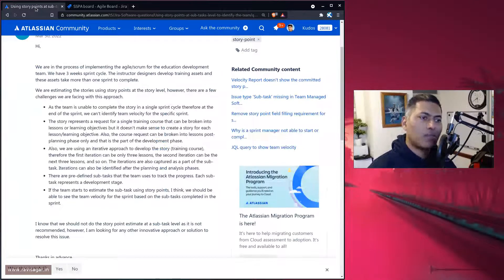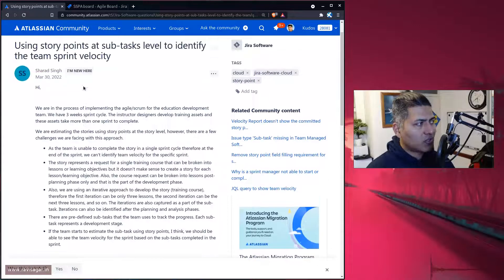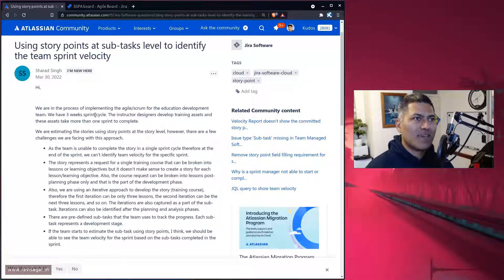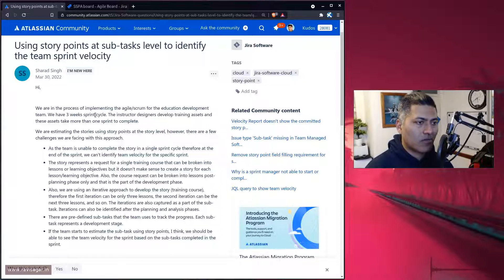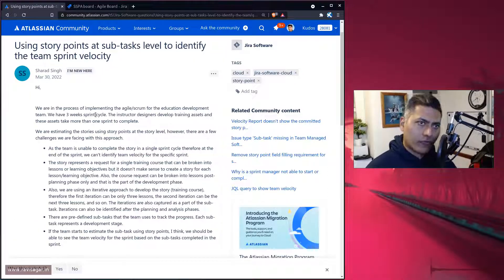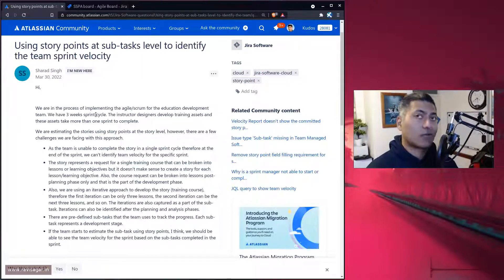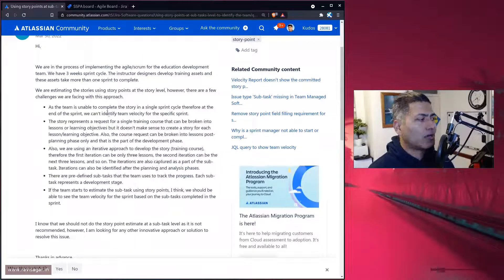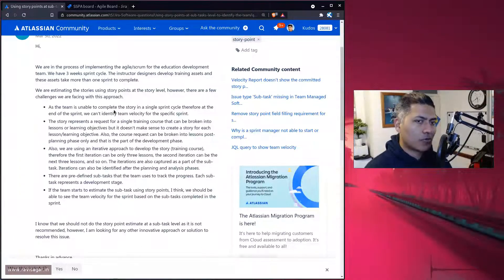In Jira, you can always use the story point field on the subtask level, but the reports won't really reflect that. What Sharad is trying to understand is how we can make sure that story points are used at the subtask level so that all the reports reflect that. However, this is not how Jira Software works.